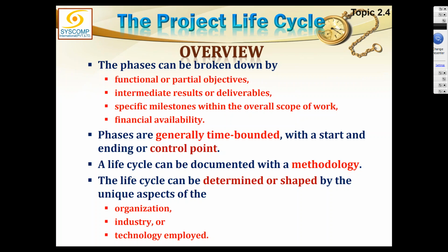Maybe you can break your phases according to the major work of the project. Maybe you do it on the technical nature of the project. Maybe you do it on some grouping or classification. Maybe you break the project into phases on the financial basis. Whatever the mechanism you use, we have absolutely no objection to that. Phases could be broken down functionally. Intermediate results are deliverables, maybe based on some milestones, maybe based on the financial availability or whatever.